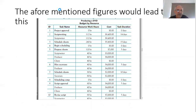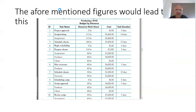Once we have those figures available, we can take a stab at budgeting the resources. For example, project approval is a task requiring zero hours of work, costing zero dollars, with zero duration. Script writing requires one person for 112 hours — multiplied by the hourly wage rate — coming out to an estimate of $8,400, to be completed in 14 days. Scheduled shoots are 240 hours, multiplied by some hourly rate, coming out to $5,400 done in 15 days, and so on.